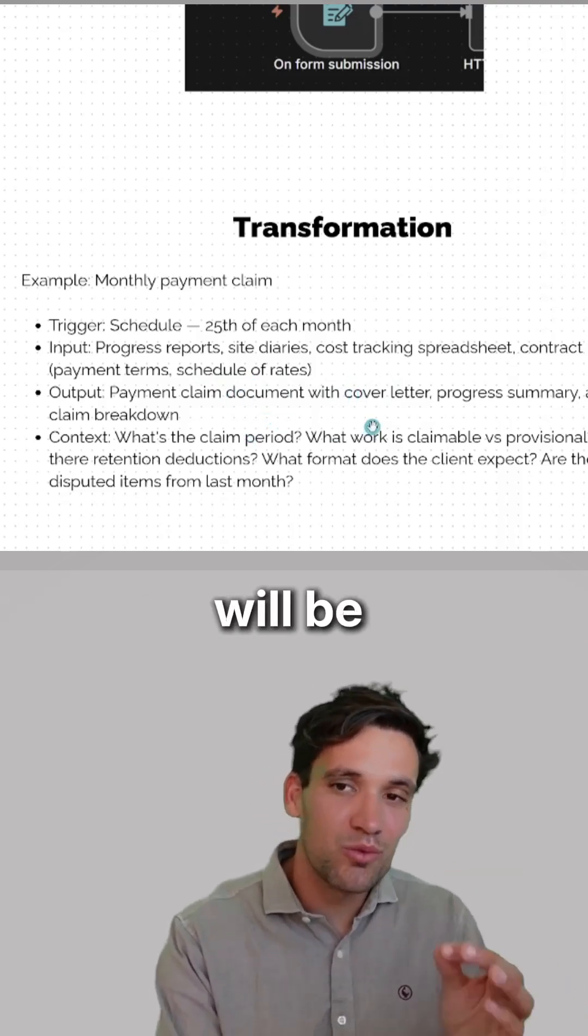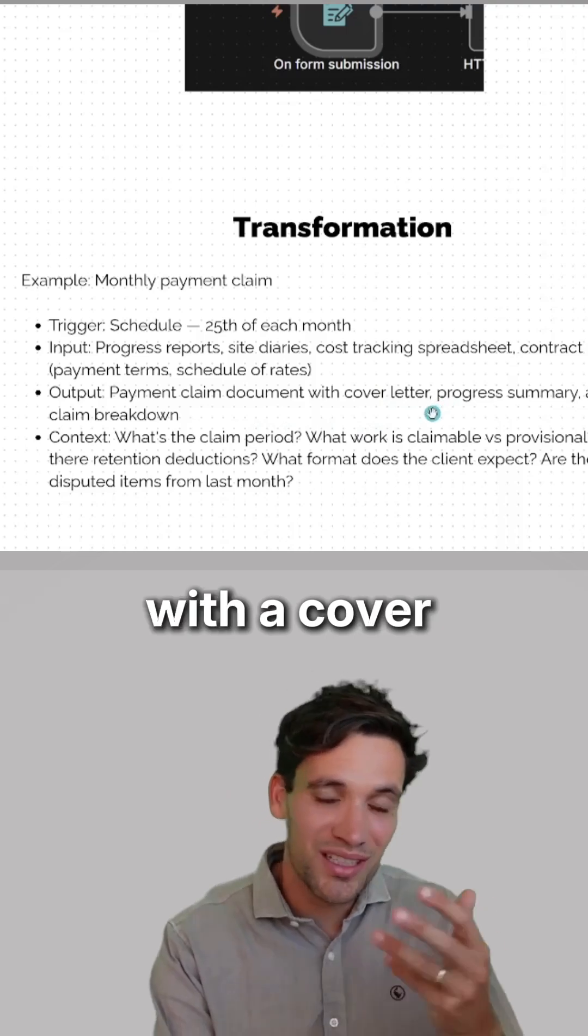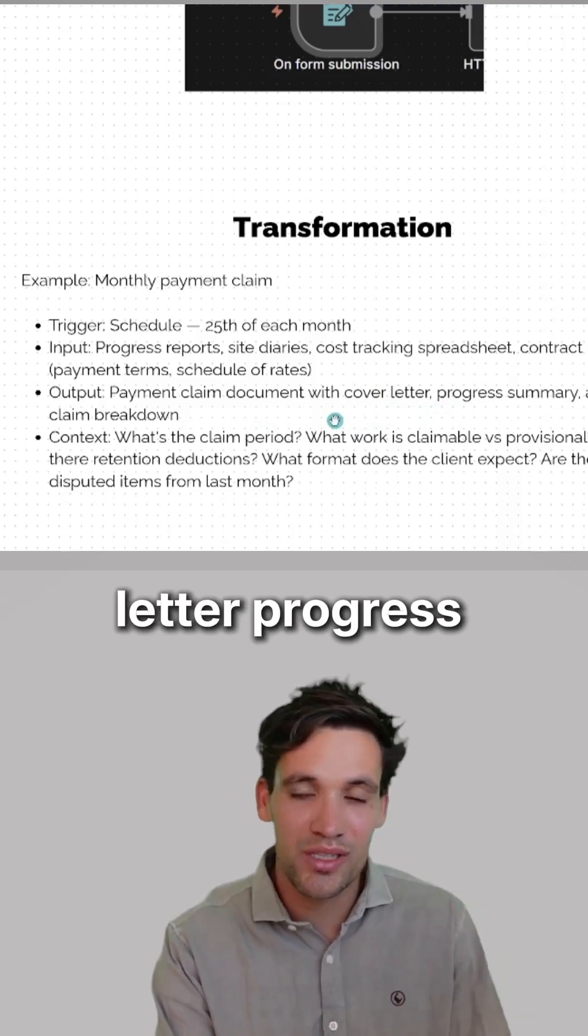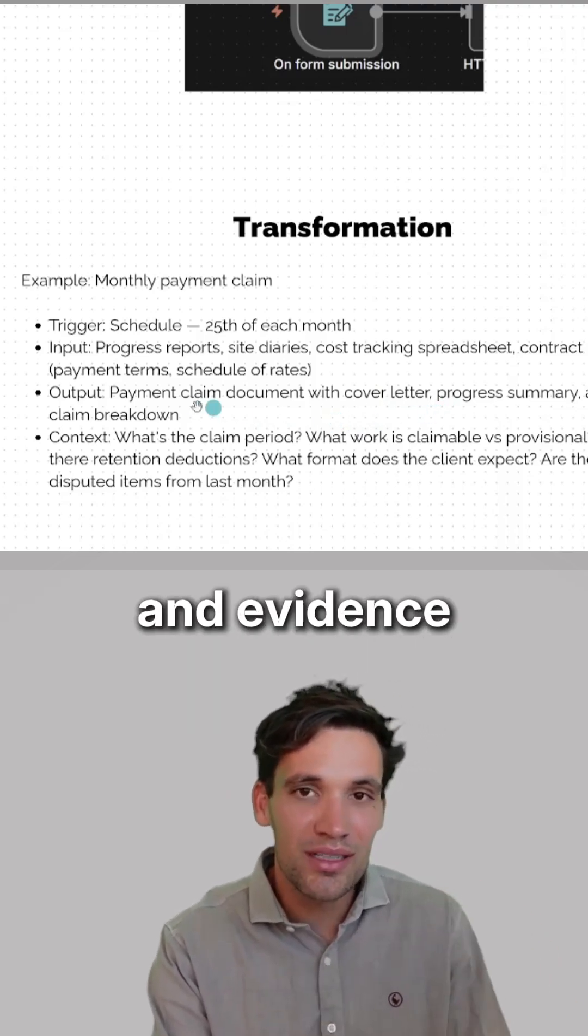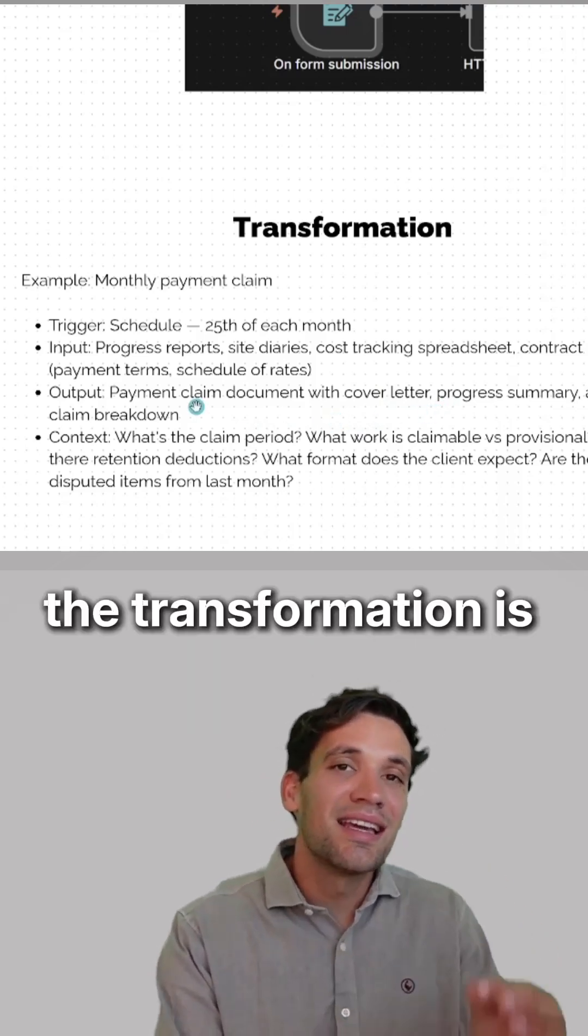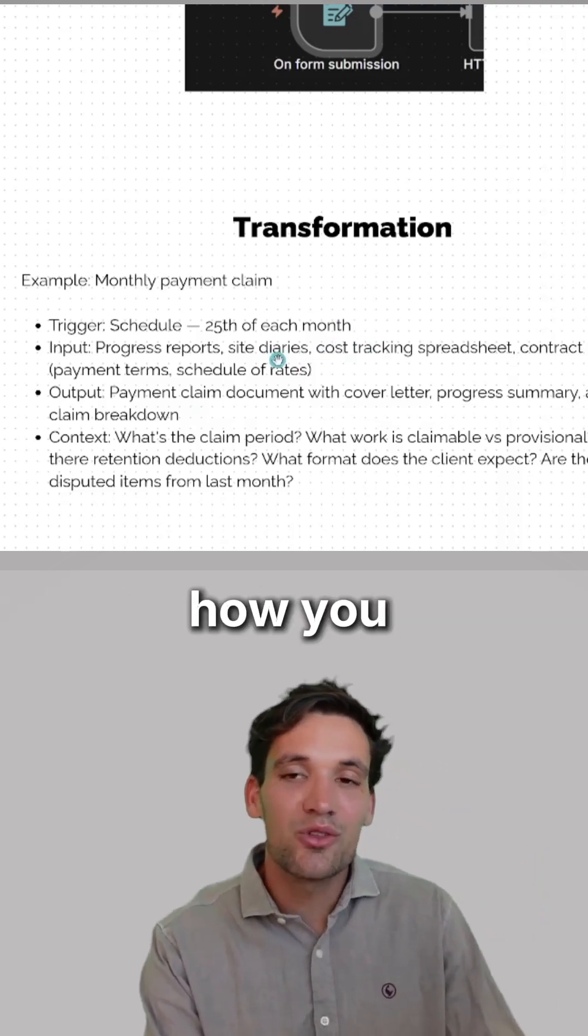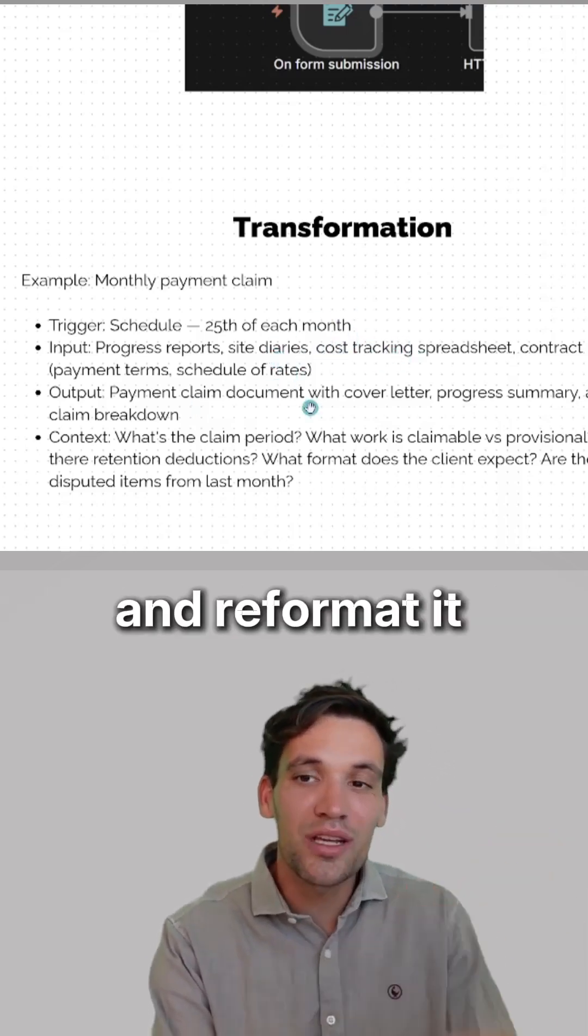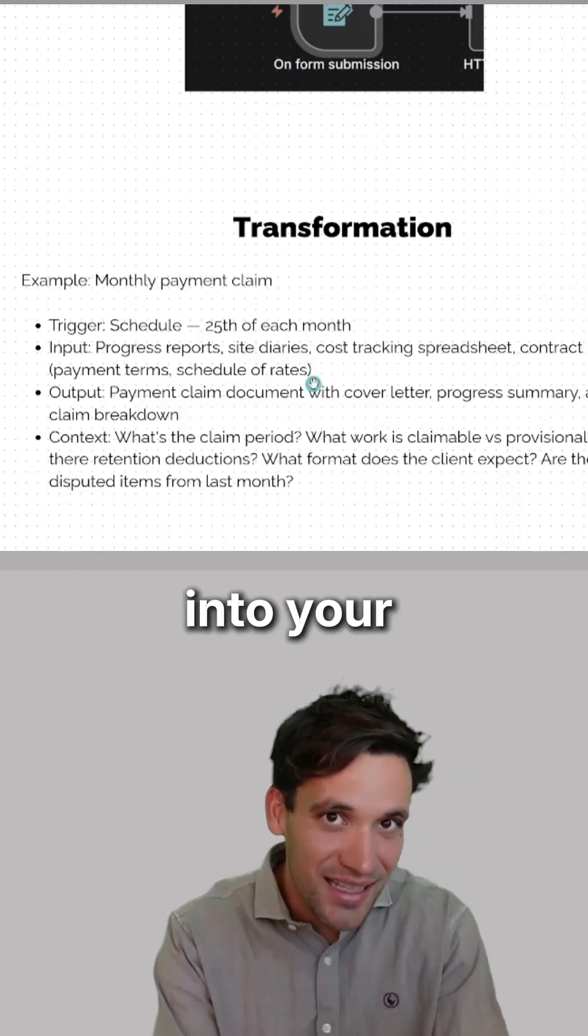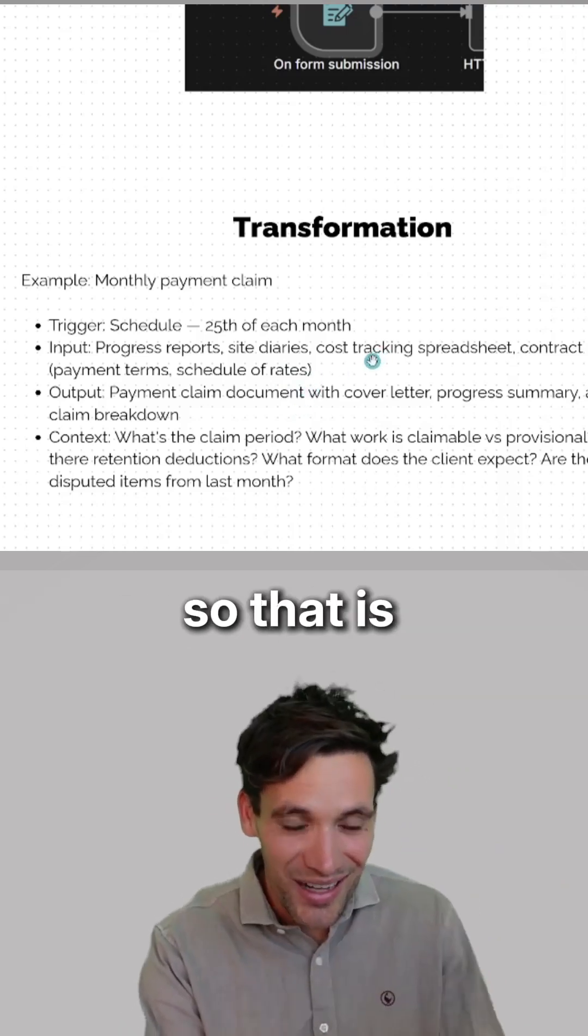The output will be the payment claim document with a cover letter, progress summary, claim breakdown, and evidence. The transformation is how you obtain and search this data and reformat it into your payment claim template.